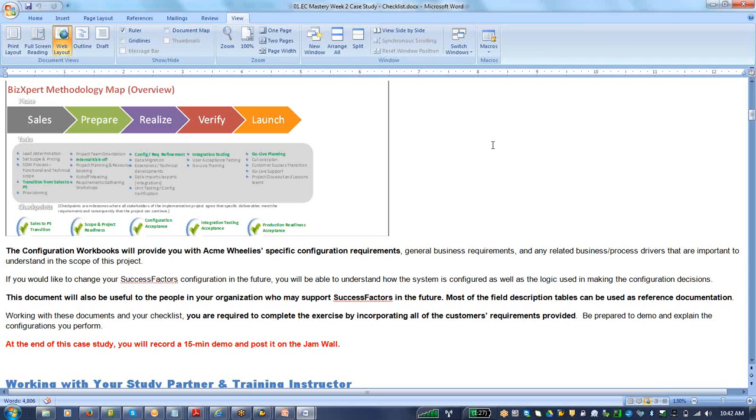Once that is done, you bring in the data, do the cutover, and integrate the data, and you use SAP Dell Boomi or an add-on or any other middleware to bring in the data. Once that is done, the business stakeholders will decide whether it is a go or no go, and then you go live. You do go live activities and go live support, and then you do hypercare support for some time, and then you take a sign off, and the project is officially closed, and it is business as usual after that.